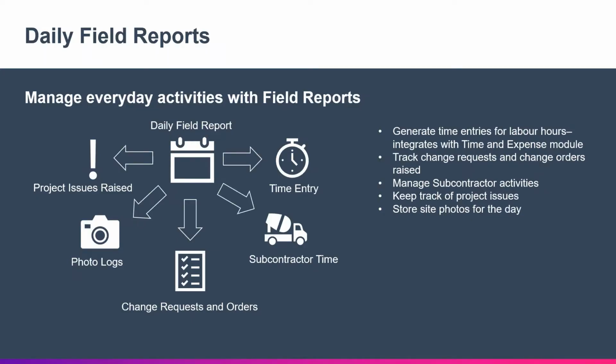Another feature that's built in to that project management module is the ability to generate field reports. So a field report allows you to consolidate everything that you need to keep track of on site into a single document. You'll be able to keep track of your own staff's and subcontractors' hours, all the change requests or orders logged for the day, as well as any project issues, drawing logs, and photo logs for the day.